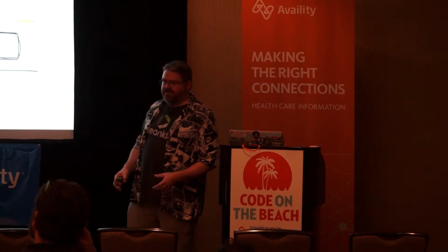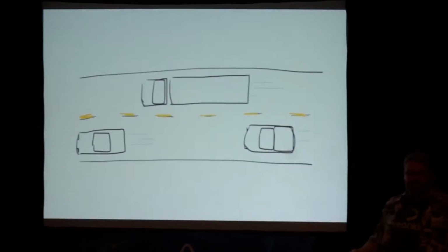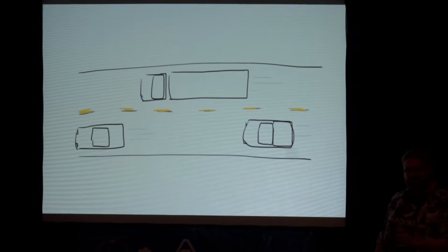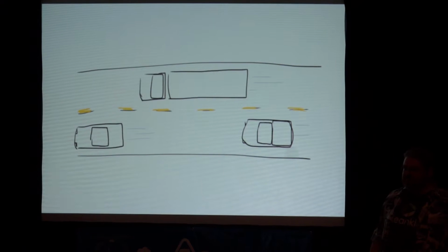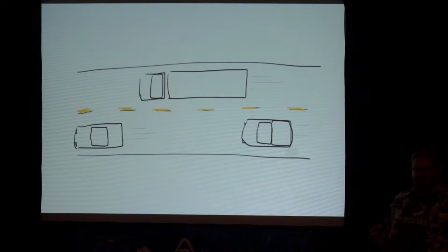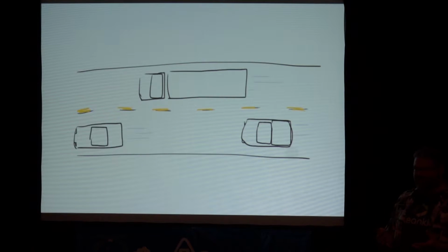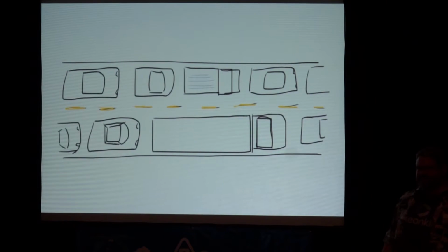Imagine a freeway that's operating like it's supposed to, with cars going at speed limit, and imagine that's your work flowing through a system. Well, we have this idea in project management that our employees, sometimes referred to as resources, which is awful, need to be at 100% utilization. We need to have our consultants at 100% utilization. Well, what's a highway at 100% utilization? It is a parking lot.